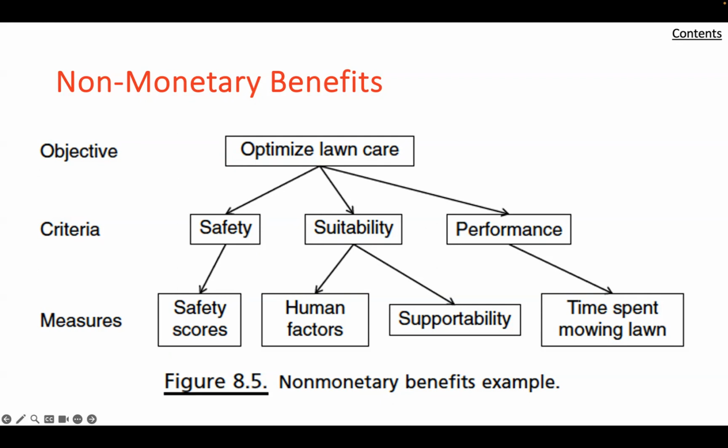Identify and examine alternatives. Ideally, here, there should be a minimum of 2 alternatives: the existing, quote, as-is system that provides a baseline of understanding and point of reference, and the future, quote, to-be alternative that is proposed. There could be several alternatives under consideration beyond that. Develop cost and benefit estimates. These could be organized into monetary and non-monetary benefits.